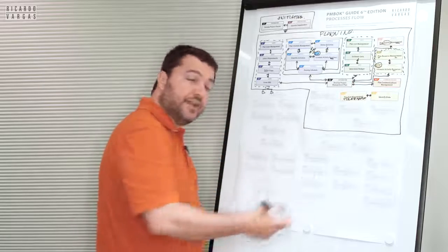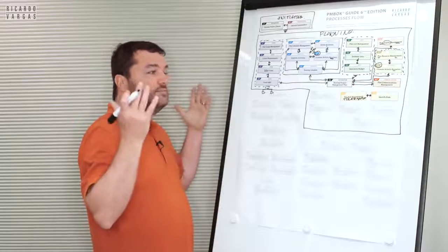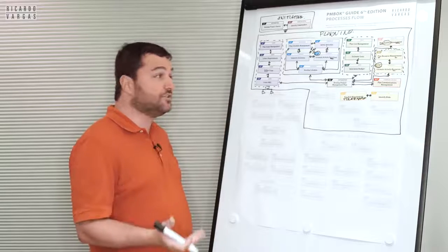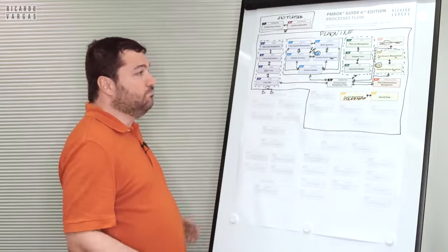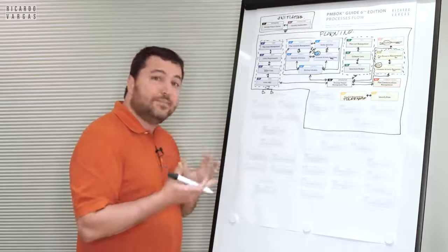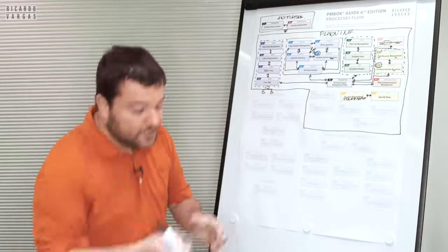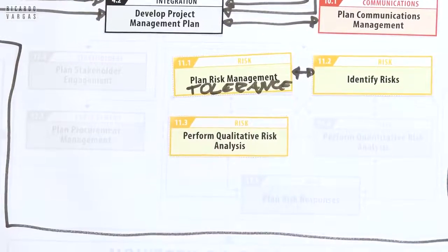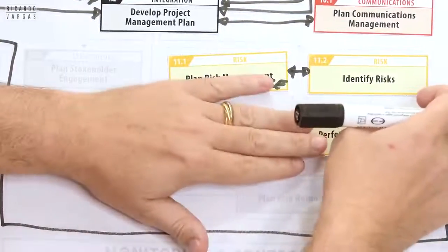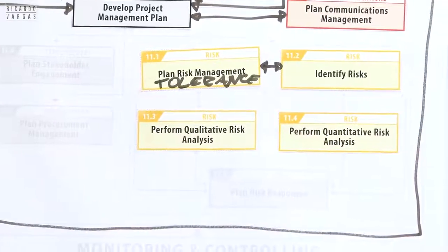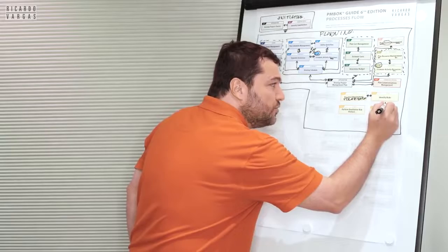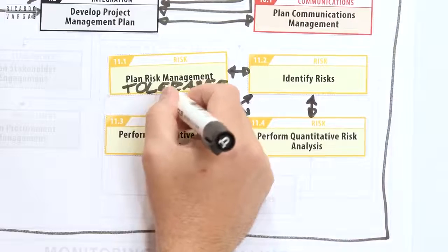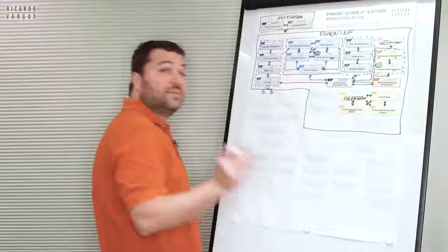Let's suppose you identify, let me guess, 300 things that may happen in your project, positive and negative. What do you need to do after that? You cannot say, oh, I will answer everything. Most of the time it's just impossible. So you do two things. You do a qualitative risk analysis and a quantitative risk analysis. So you do both. What is the difference between these two items? Qualitative, I use a scale.